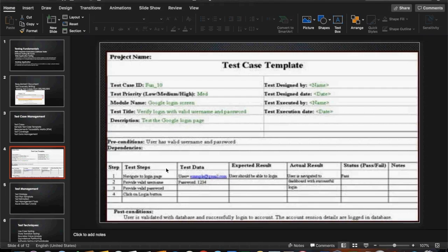We've created test cases, maybe 100 test cases, and they've given us 2 weeks to test. And there are 2 resources. So if you are doing 7 a day, each person is doing 7 a day, it means 14 that we are doing in 1 day, and we have 100. 5 days might not be enough to test the 100, without even calculating from the top of my head.